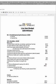Now you say, Todd, how do I know what's going to be done? Well, once we're through demo and we know exactly where we're moving forward, I contact you and tell you the change orders, and then I go through it with you and I tell you what the pricing is. So since we had 400 there, take away the second floor, that's going to be $500 to remove the second floor. Okay, so there it is. Remove the second floor. If you remember right, that was 1,500. So we're still ahead of the game by about $600.